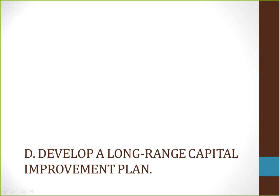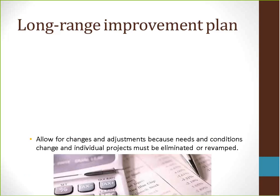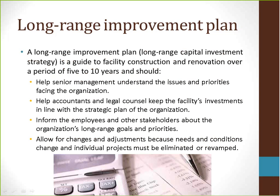Next, developing a long-range capital improvement plan. A long-range improvement plan, also known as a long-range capital investment strategy, is a guide to facility construction and renovation over a period of five to ten years. It should help senior management understand the issues and priorities facing the organization, help accountants and legal counsel keep the facility's investments in line with the strategic plan, inform employees and other stakeholders about the organization's long-range goals, and allow for changes and adjustments because needs and conditions change and individual projects must be eliminated or revamped.